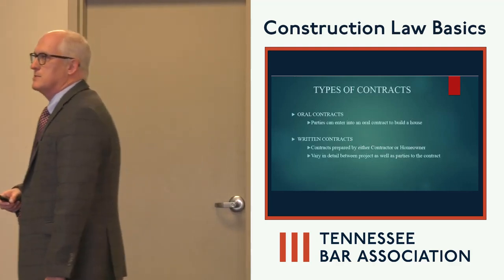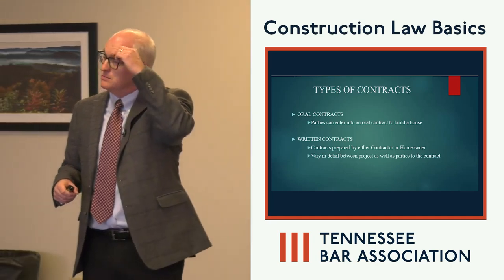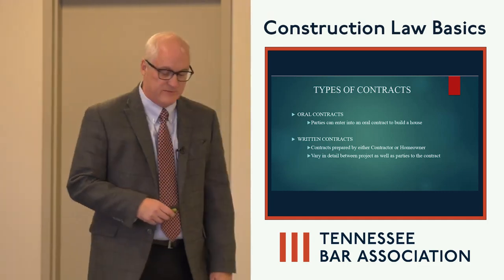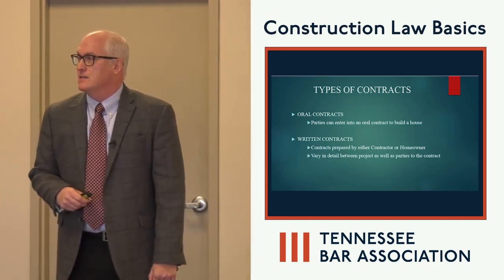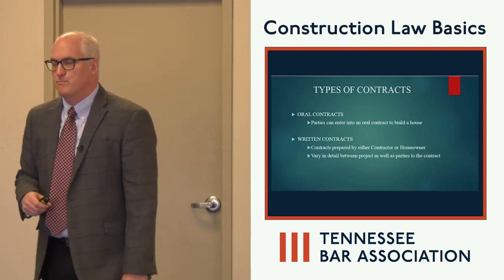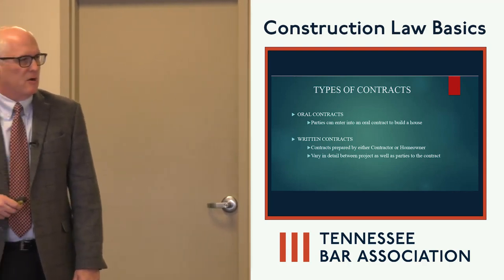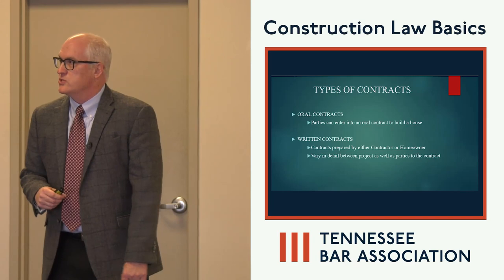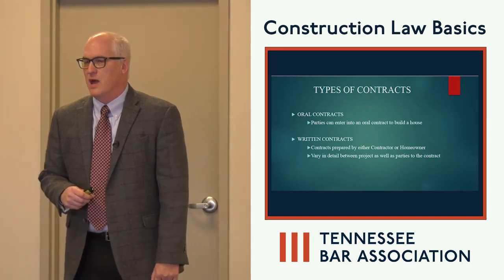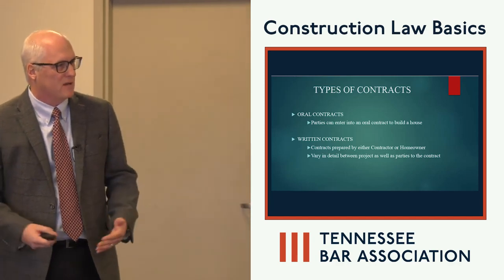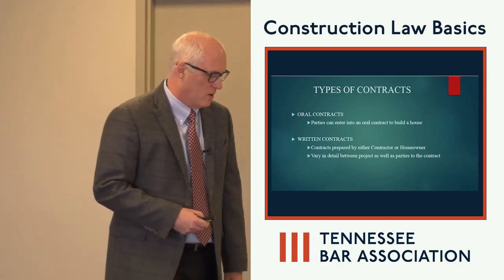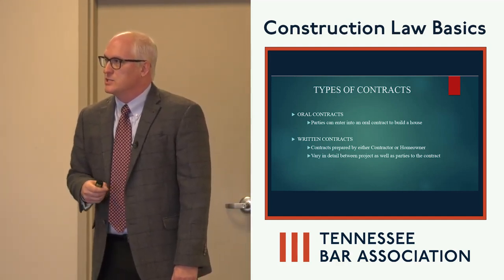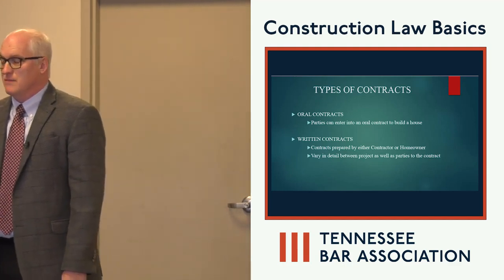Starting off, just obviously the different types of contracts you may have in a construction context. It's not advisable, but I've seen oral contracts come down the pike for the construction of houses. I had a client come into my office that built probably a $700,000 house a couple years ago with no contract whatsoever. Most folks that come in, they'll say they don't have a contract, and my response is, well, you probably did have a contract, it just wasn't written. All you really need is offer, acceptance, consideration, and off you go.